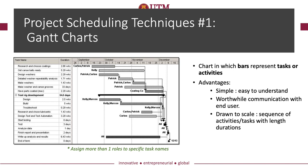The bars represent the sequences of activities with the specified time duration. Add-on information such as specific roles or team members, as well as milestones as targeted deliverables for each activity, can also be represented on the bars. You can use tools like Microsoft Project, Microsoft Visio, or other free online applications such as ClickUp or Trello to draw the Gantt Chart.